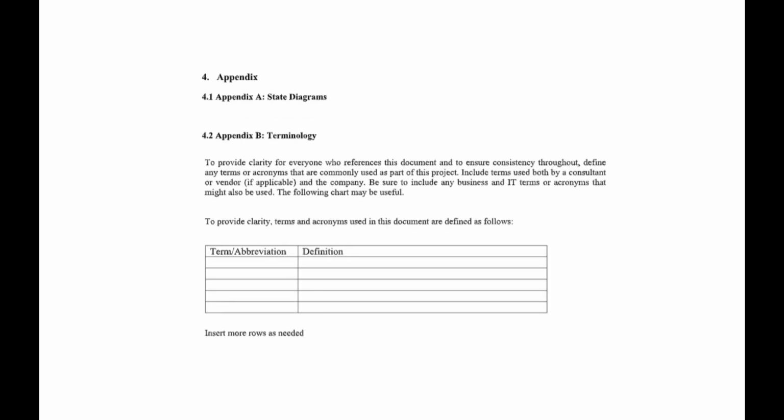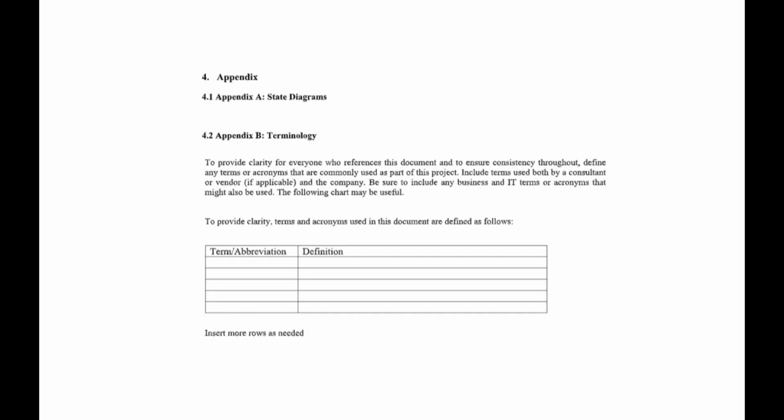Next section includes the success criteria, clear criteria that will be used to determine the success of the project. Next sections, dependencies: identification of external factors or tasks that the project depends on. Next, risks and mitigation strategies will include the identification of potential risks and proposed strategies for mitigation. Next section includes the approval and the sign-off, space for stakeholders to review and approve the document. Last section is the appendix, which will list the additional supporting information, such as charts, diagrams, or reference materials.